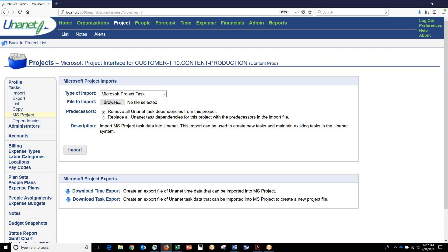You could also import from Microsoft Project, so if you have a Microsoft Project plan, you could feed that into UNINET. Most customers now will do everything directly in UNINET, and then if their customer wants to see the data in Microsoft Project for whatever reason, they'll export the data back out to Microsoft Project. Most customers do all the project task management in UNINET, and then you could also ingest from Excel as well.